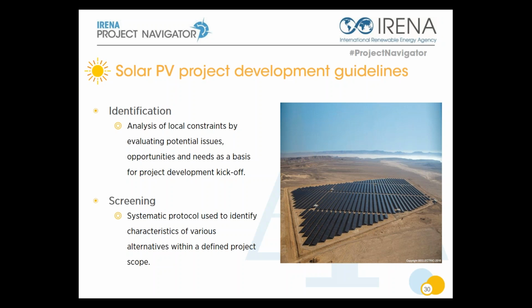For example, some lands cannot be adequate for a given technology or a change of technology. So you need to understand what the constraints on your site are. In the course of development, if you have to change technology or change site, you will not be constrained to the level that you need to consider another configuration, which will put you months behind. This is an example of showstoppers that you need to consider early on, so you are prepared to address those questions.